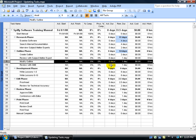So if you see weird things going on when you enter in your Actuals or make some changes here that are highlighting different dates that are either increasing or decreasing, you want to do a little detective work and find out if you've got task constraints on one of the tasks.